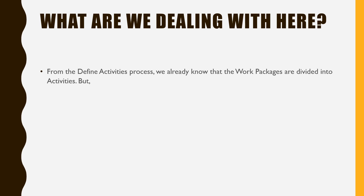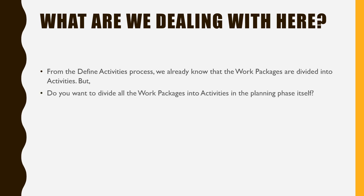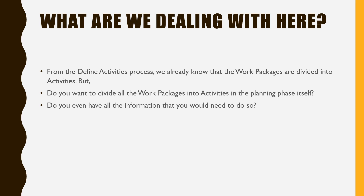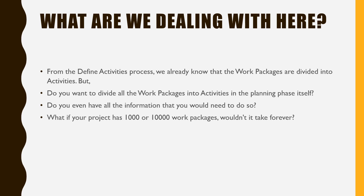But there are certain questions here: do you want to divide all the work packages into activities in the planning phase itself? This process is from the Planning process group. Do you even have all the information that you would need to do so? A work package could be anything — you might not have the information to decompose it into activities in the planning phase. What if your project has 1,000 or 10,000 work packages? Wouldn't that take forever?